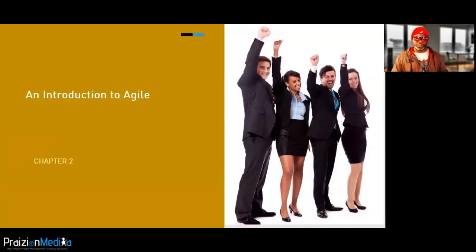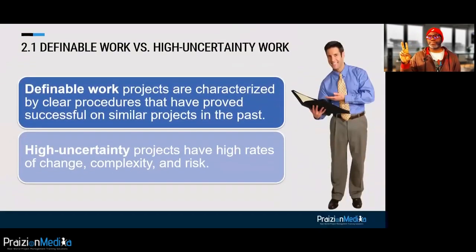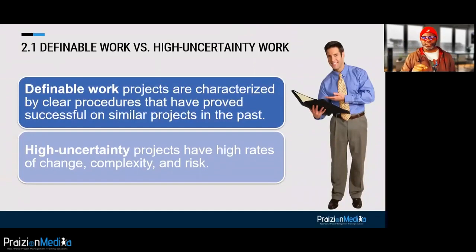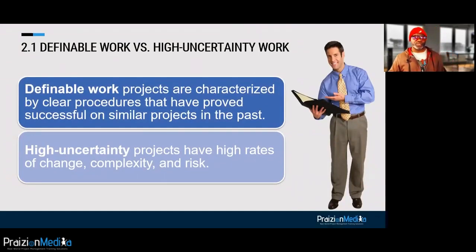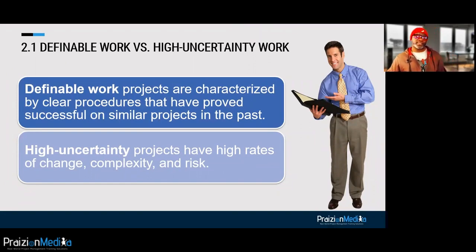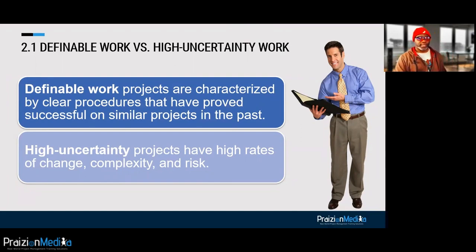Let's go to chapter two, called an introduction to Agile. Two types of work: definable work and high uncertainty work. If you're working on high uncertainty projects, you want to use an Agile approach because it's better to cope with change and complexity. For definable work, it's better to use a predictive approach.